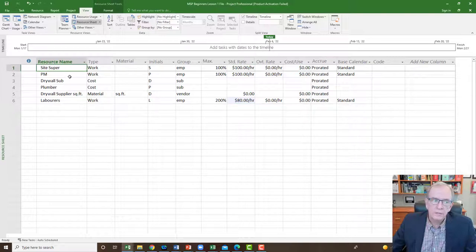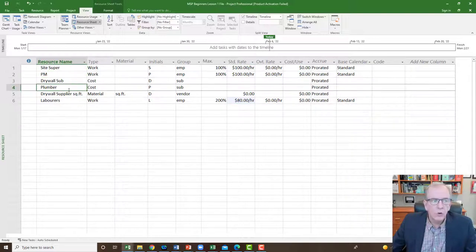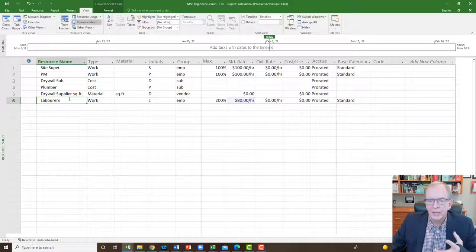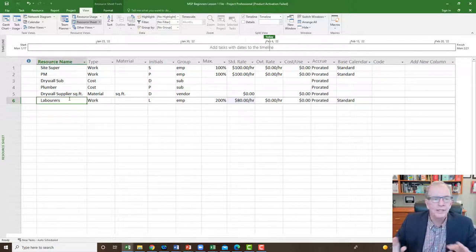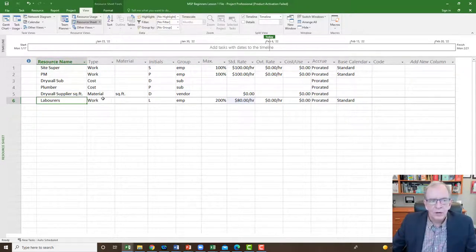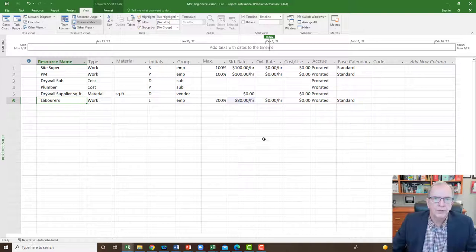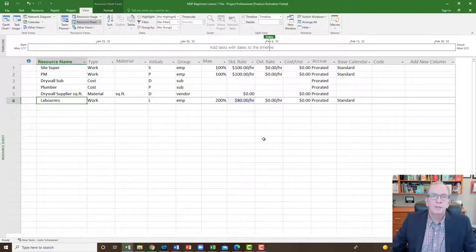If you only want to apply a resource to an activity to track accountability without costs, you can just type in the resources and leave them all as work without filling in any costs. That's fine — you just won't be able to monitor the project for costs, but you can monitor it for accountabilities and how well those accountabilities are holding up.